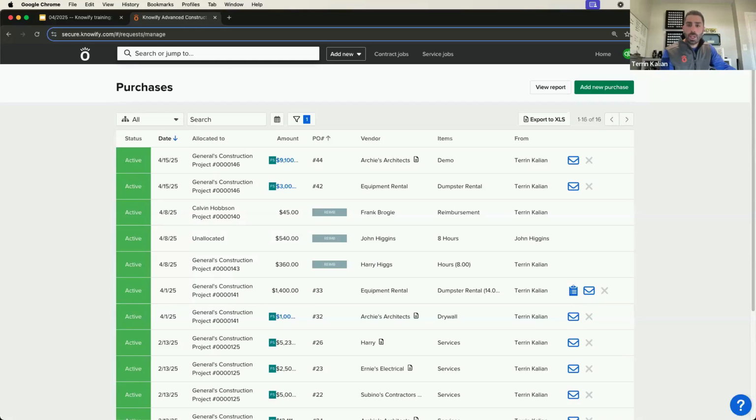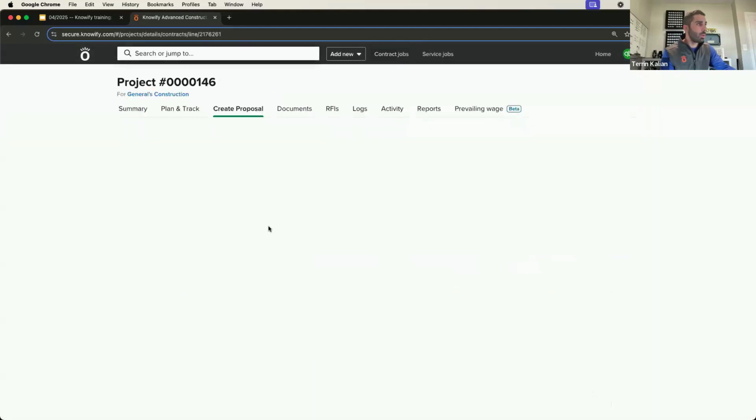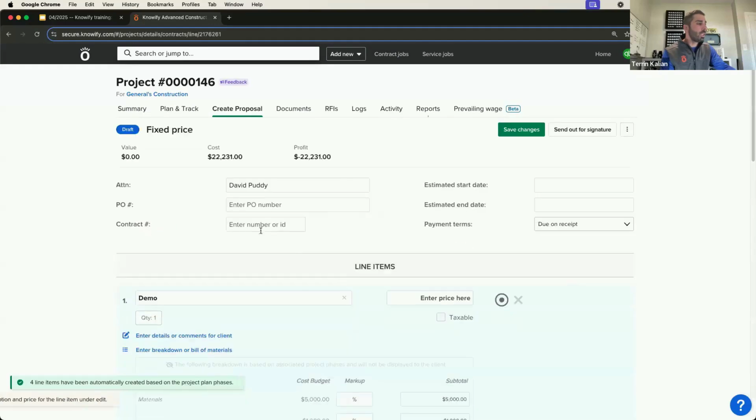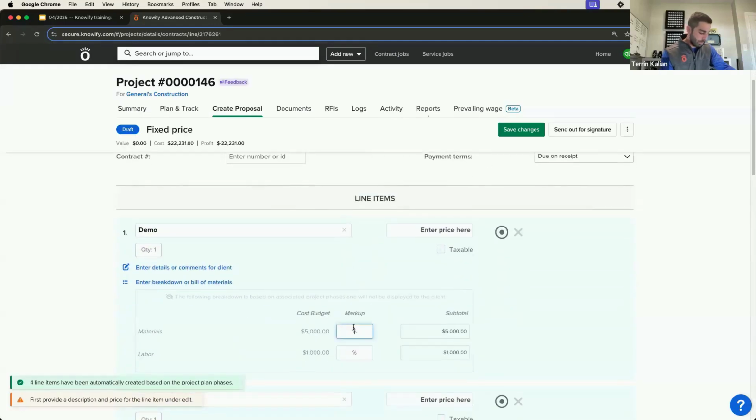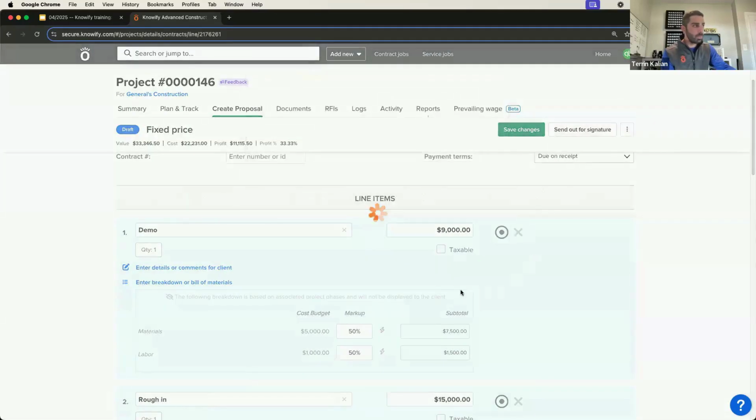Someone asked about adding a change order in the contract and how it should update the budget. I'll do a really quick rundown of this just because it's a neat feature that we have. But if you want more information on this, definitely connect with our team on it. Technically, adding a change order shouldn't adjust the budget automatically since even though you'll be charging more, you might not necessarily want to change how much you originally planned on spending.